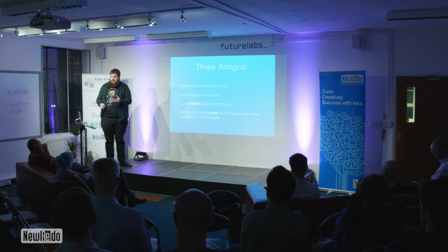I won't go back over the 3 Amigos too much because I've already talked through the theory enough, but reinforcing that, so making it a more crucial thing, has to happen. It has to happen before a ticket's picked up. And if we've had a pre-Amigo session with 3 or more, ideally, most of the people that were in that, so at least 2 if it was only 3, should be the same people when it's picked up, so that that shared understanding is carried through.